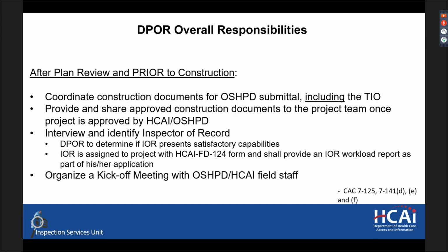So after plan review and prior to construction, the DPOR should be coordinating construction documents for OSHPD submittals, including the TIO, prepare and share the approved construction documents to the project team once it is approved by HCI and OSHPD, and interview and identify the inspector of record.